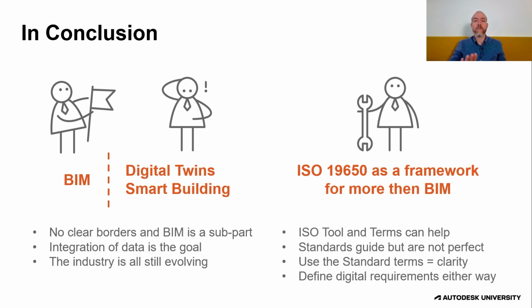Now, again, whether or not you want to implement the standard as a whole or just in part, the one thing I would say to all client groups out there is define your digital requirements upfront and make them part of the contract. It's important to understand that because it is a digital deliverable, it is still a deliverable. It still needs to be evaluated and weighed against, and it can't be left so ambiguous that people are halfway through a project and not really understanding what BIM means on this project.